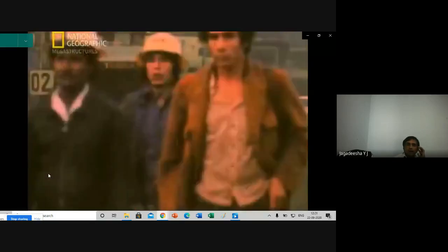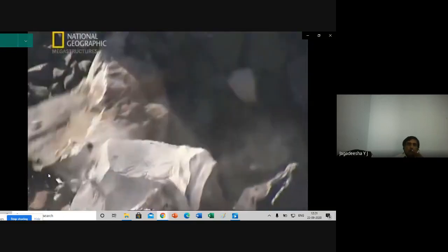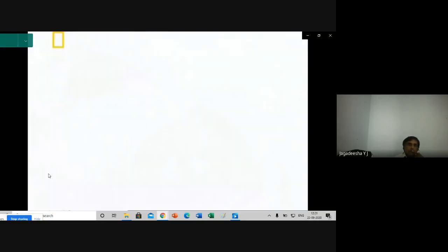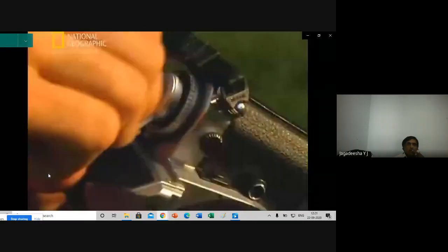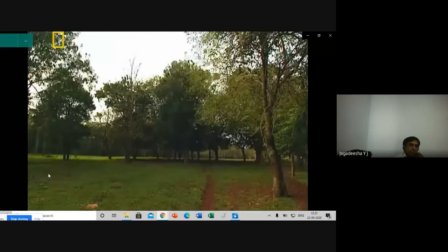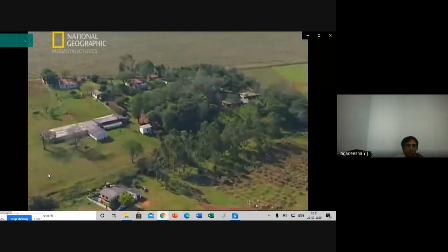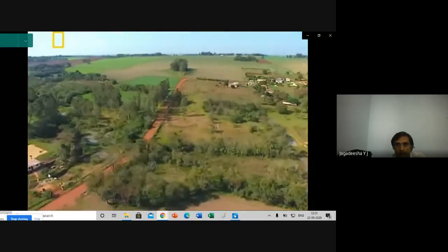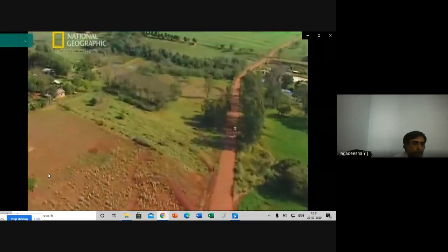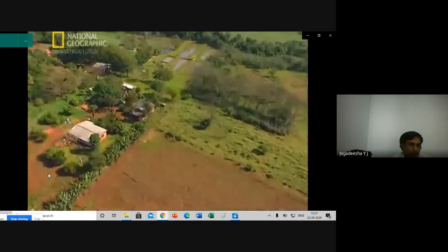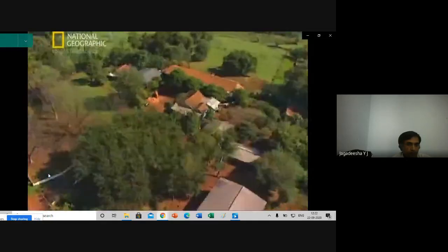Autumn 1975. Work began on the secondary dams. Meanwhile, the valuation of the houses, farms and land in the river valley which the dam will flood has also been completed. Brazilian and Paraguayan authorities have learned that before they submerge the area under 100 meters of water, they must buy up 8,500 homes and farms. The cost? £1/3 billion in today's money. That's on top of the multi-billion-pound price tag for the dam itself.